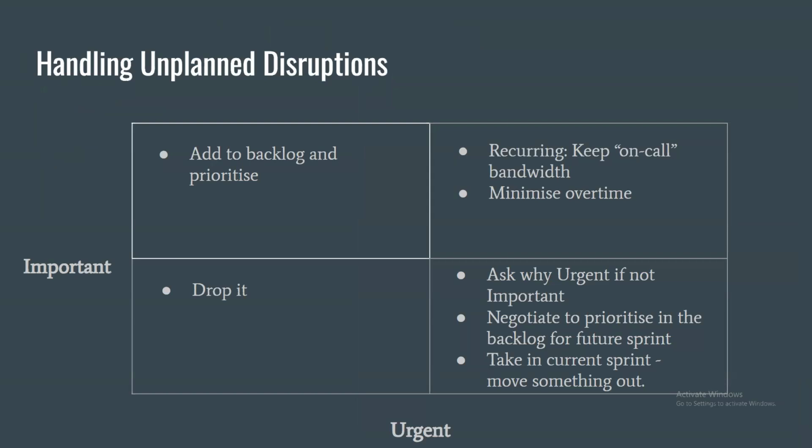So if you have a very contract-driven nature of work, where something has already been written, this is the exact scope of the work, which typically happens in a consulting kind of organization, for example, Infosys and TCS, if they are working with a very hard contract, then you should evaluate if Scrum is right for you. Because Scrum by nature encourages people to come up with alternatives. So that's the first thing.